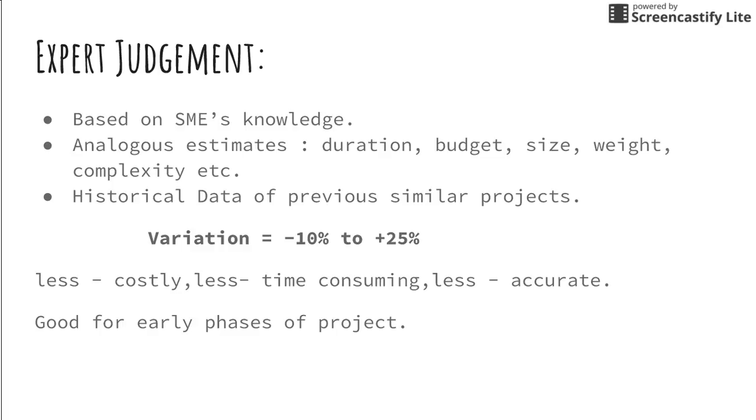These types of estimation are generally less costly and less time consuming because you are taking references from other projects, and are less accurate because the variation is still huge, but again good for early phases of the project.